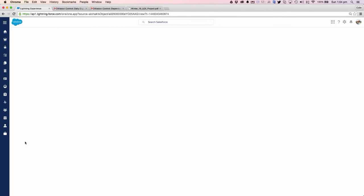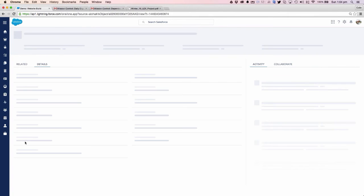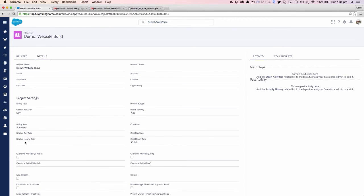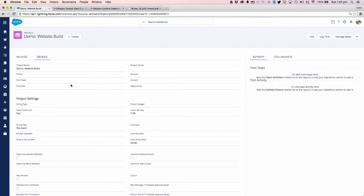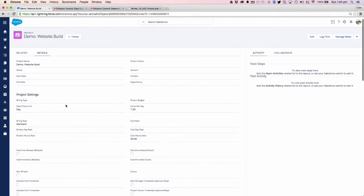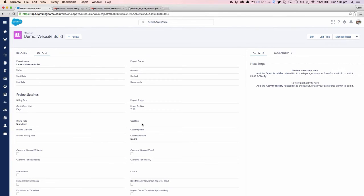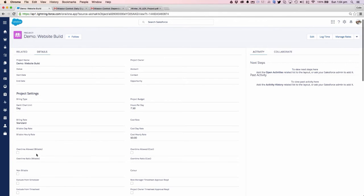Once we've got a project and our three milestones, we can create that framework and then we'll be able to actually go ahead and fill in a few more details around the project. We can specify things like, is it a fixed price project? Is it a time and materials project? What are the billable rates? What are the cost rates and so on? You can see here I've got my project created now, so I can go through and specify billing rates, cost rates, how much are we being billed out to the client for, how much are we paying our staff to do the work.